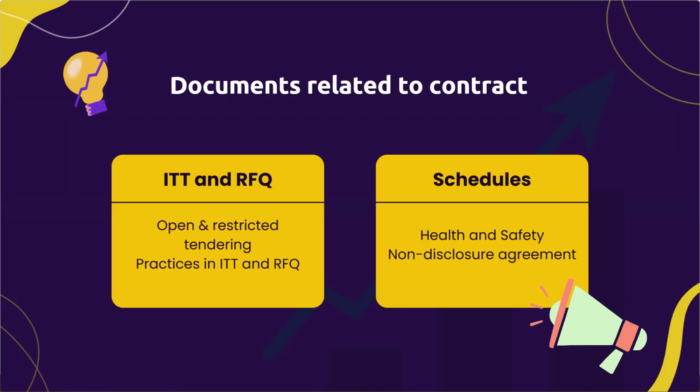We can award them the contract if their price fits into our budget or if they provide a very competitive price. Otherwise, tendering would be better if the project is more expensive or we need to qualify or look at the risk from the supplier. With tendering, we may use different criteria to assess and ensure that the supplier is fit to deliver the contract.